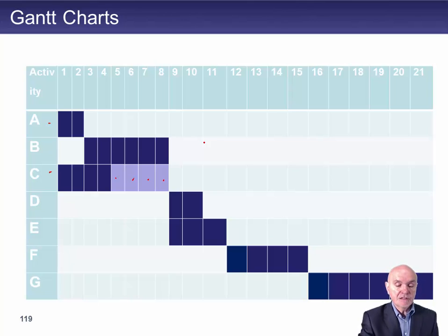These sometimes are shown by dotted lines. Those are the 4 days around which we can shift this C here, the making of the windows and doors. There's a bit of spare there. And similarly in here, I think I've left out some of these blue bits, but here I think we can see there's maybe a day there, which is maybe a little bit flexible.